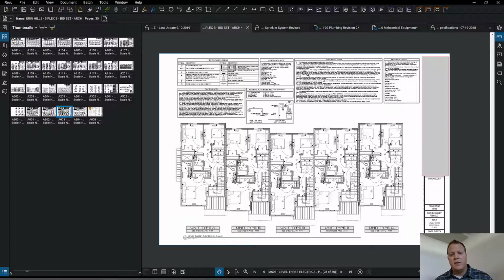Well, the contract documents govern the most, meaning the drawings and the specifications. That's what we're contracted to build. Unless there's a change to the contract through some sort of modification, change order, whatever process you want to talk about there, that's fine. But until they're changed, we're contracted to build what's on the drawings.